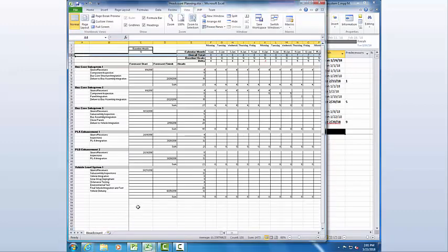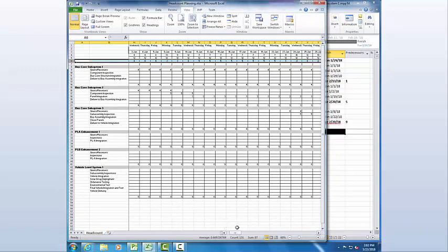After this information has been logged, the scheduler is able to compare the current requirement with the number of available heads, the goal being to balance the schedule with the monthly allocation of employees to that project. This is done by shifting certain tasks around the timeline in an attempt to get a delta that is as low as possible without over-assigning employees in an effort to optimize utilization.